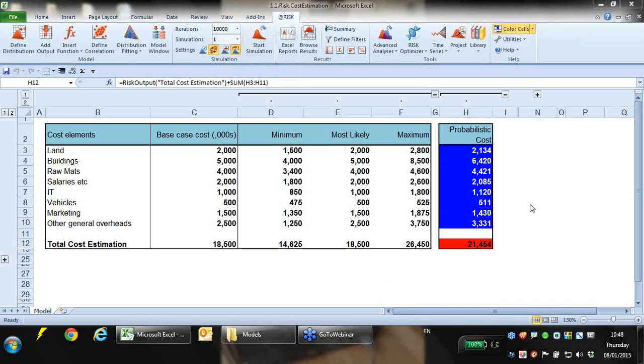Generally speaking, that's also something you can test yourself. You can do 10,000 iterations, and then you can run 100,000 and compare the results and see if they're much different. Can we see the most sensitive factors to an output in the same way that can be seen in top rank? Yes, absolutely. I will show you that in a moment.